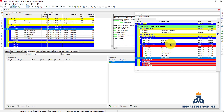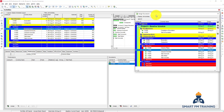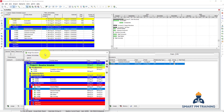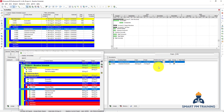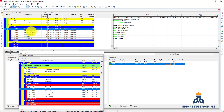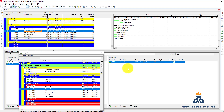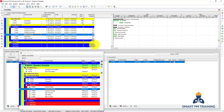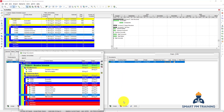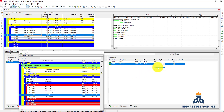For the column-rebar and formwork I will add a start-to-start relationship with one day lag and a finish-to-finish relationship with one day lag for column-formwork. After that, for the concrete - just one day - and slab-formwork start-to-start one day lag, and also slab-rebar with a finish-to-finish relationship, lag one day.